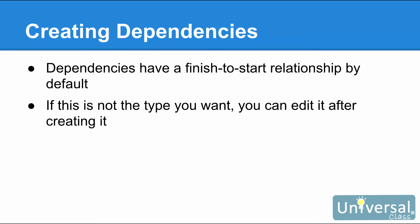If you want a finish-to-start dependency, then your life just got a whole lot easier. If it's not the type you want, after you create the dependency link you can edit it to change the type, or build in lag or lead time — essentially time in between the pair of tasks.